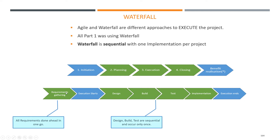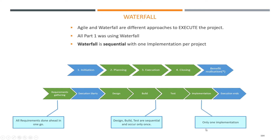If they want something different, if they want a change, we just invoke the change control process. We say: sorry, you need to go through the change request process and it needs to be signed off before we even have a closer look at it. So we do all of that once, and then we implement once.